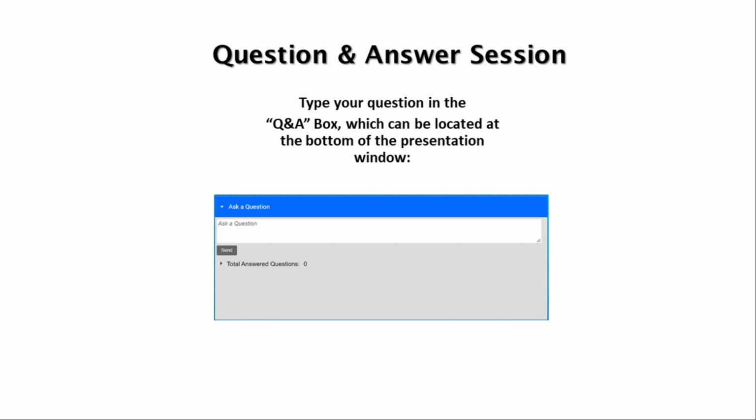They want to know how they were taken care of. They want to know if ethics committees were involved. So that application takes a lot of parties to be able to answer all the questions. And it can take a lot longer than some of the other applications to get approval.